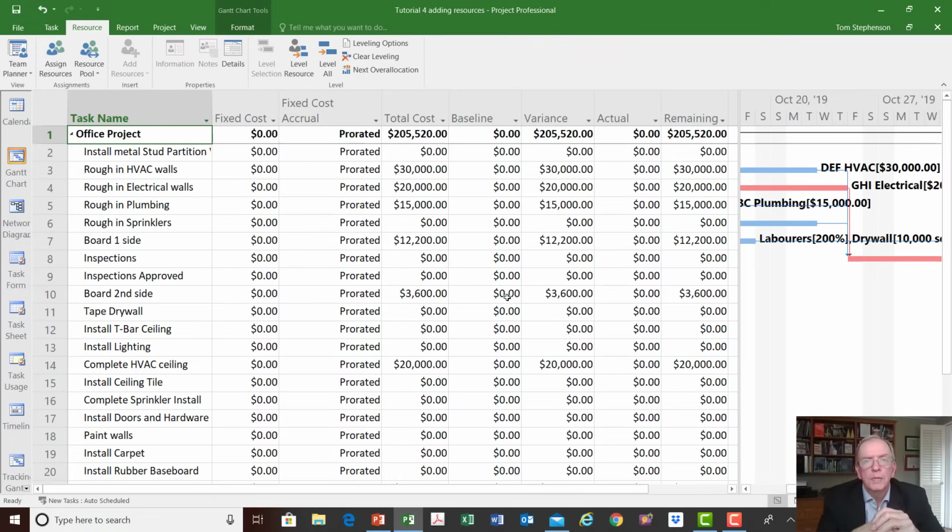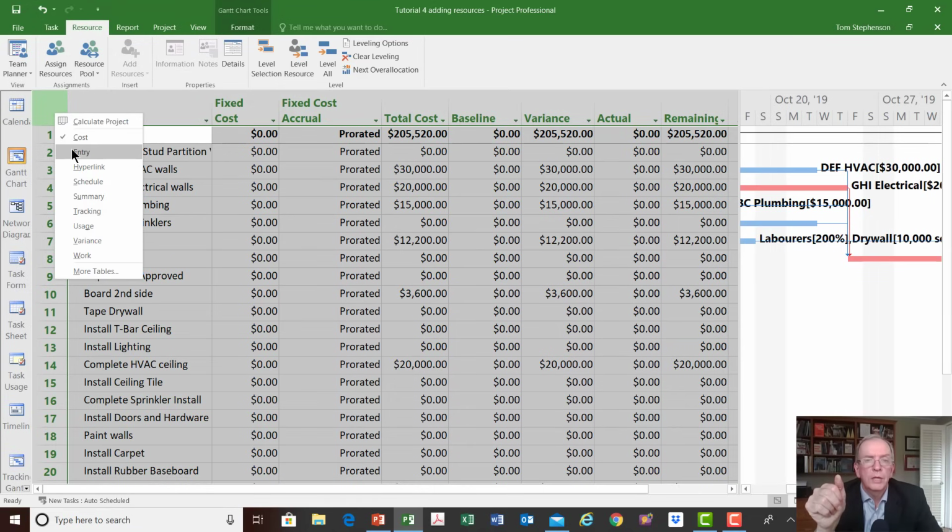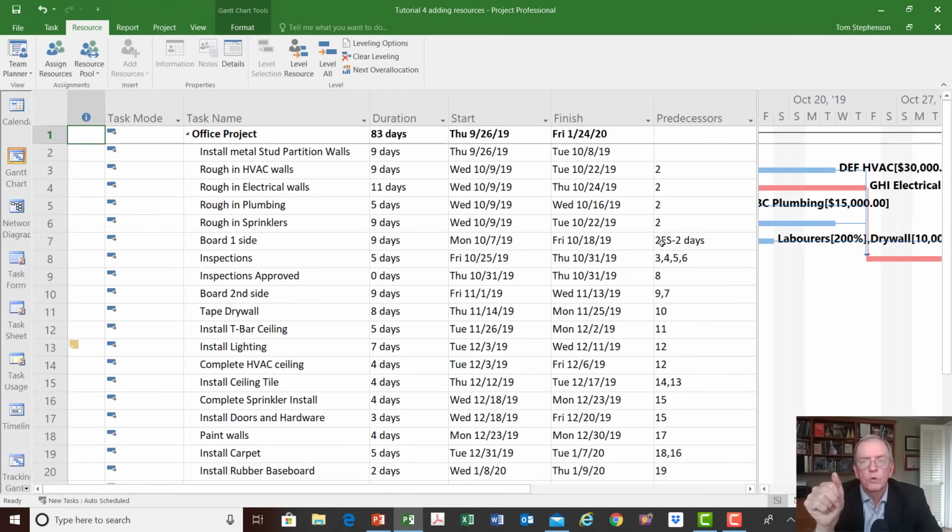Ones that we haven't, we're going to be looking at historical data that we may have, experience. We're going to be drawing on a number of factors and pulling together timeframes and durations to come up with our overall schedule. And we're thinking about how the sequencing has to work, how many things we can have going on at once. And this is our best effort of this plan at this moment in time.